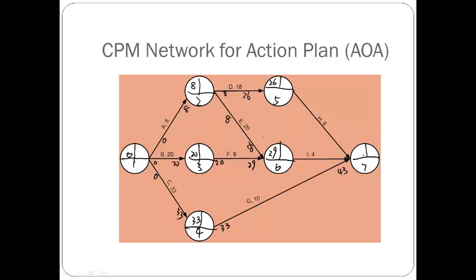And this one I have to wait. One needs to wait for here. So this is 26. 26 becomes the earliest start time. And 26 plus 8, 34. 29 here, 29 plus 4, 33. So you choose from 34, 33, and 43. 43 becomes the event for ending because that's the largest. And this is the terminal node now. And at the terminal node, your event time, early finish and early start, are the same.